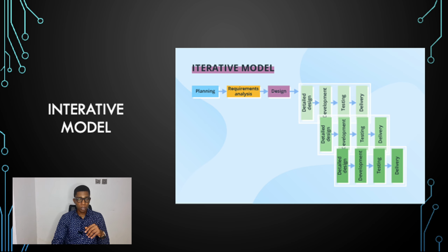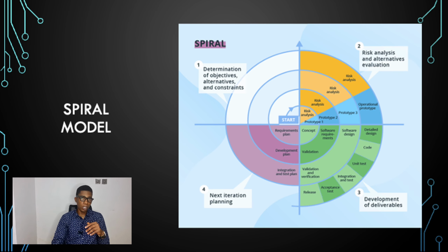There's also the spiral model. We'll be looking at the spiral model next. The spiral model puts focus on thorough risk assessment. To reap the benefits of the spiral model, you need to have people who are specialized in risk assessment. A typical spiral iteration lasts 6 months. It includes 4 important activities: thorough planning, risk analysis, prototype creation, and evaluation of the previously delivered part.